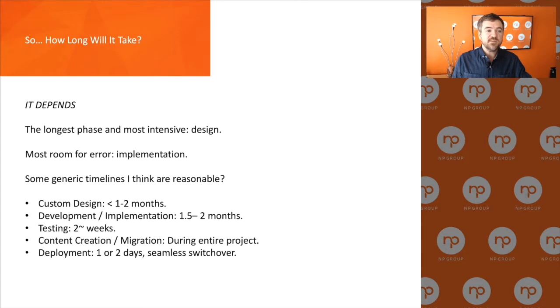The one thing I've noticed, every client says they're going to be quick, but it's often not the case. So one of the things you can do before the project is come up with an internal process for what to do when these designs come in so you could turn around feedback quicker. That would be a very good thing to do.